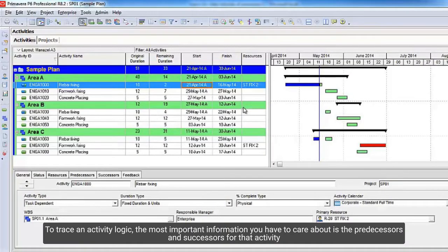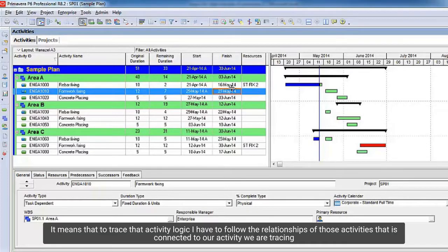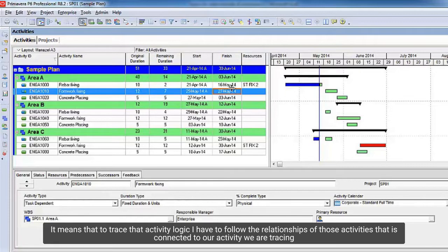To trace an activity logic, the most important information you have to care about is the predecessors and successors for that activity. It means that to trace that activity logic, I have to follow the relationships of those activities that are connected to our activity we are tracing.